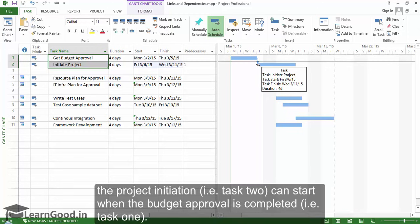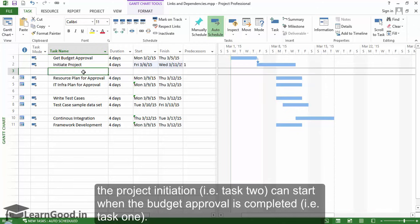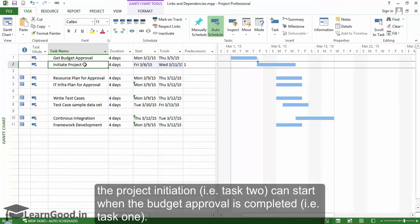In a Finish to Start dependency, the second task in the relationship cannot begin until the first task finishes. So in this case, the project initiation — that is Task 2 — can start when the budget approval is completed, that is Task 1.